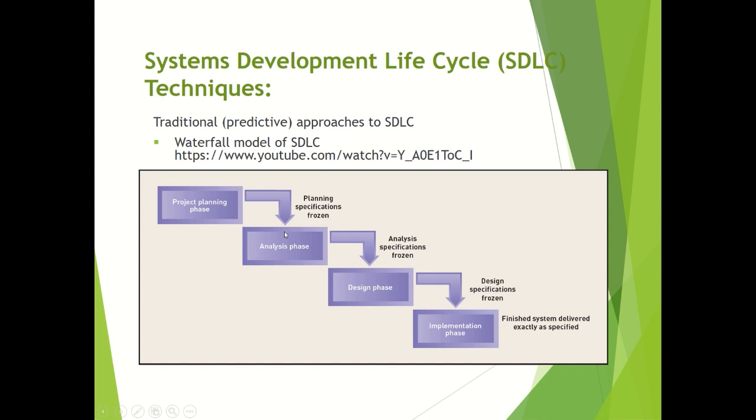If you want to make any changes at a later stage, it is really difficult to do that. So if you have a clear requirement specification at hand, if you know what you have to do, if you know the system really well, you need to make a small change, or if you are applying it for a smaller project, you can go for the waterfall model.